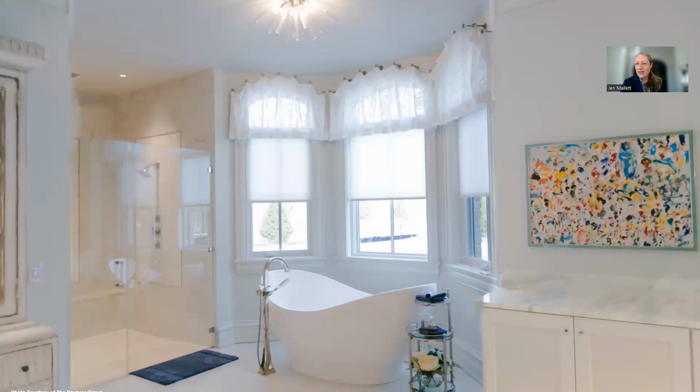So the type of products that you want to plan for as part of that process as integrators, when we're there, we're looking at what might be a smart shower. So showers that are able to control temperature, able to control the water flow. And in many cases, people love to listen to music in their shower. So that needs to happen within the technology design process early on, so that you're wiring correctly, so that that smart shower can have a Cat6, which is a networking cable, to it, so it could be updated, because now your shower needs to be updated, which was never a thing 20 years ago.